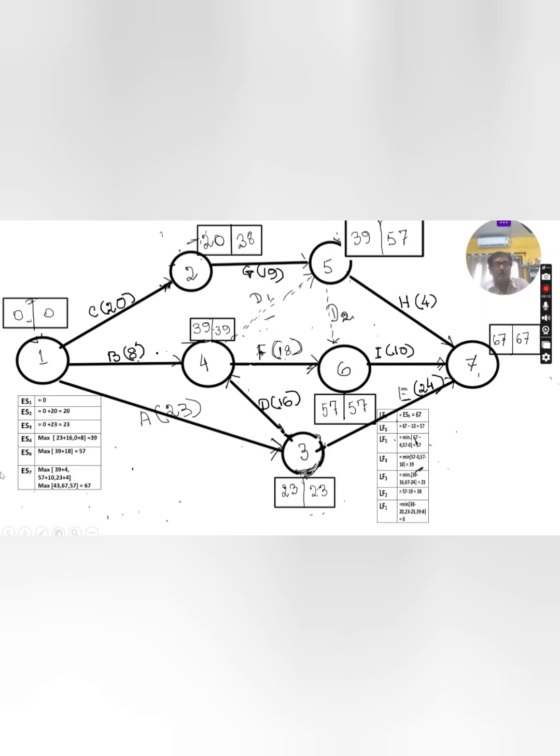How we will determine it, that I will discuss. In this box, on the left side, this part is noted for earliest start time, and this part will be noted for latest finish time. So first we will calculate and present here the earliest start time. This is ES1. The node is 1. It will be 0 because this is the first node. On this point, all these activities are being started. That's why the earliest start time for these activities is 0.